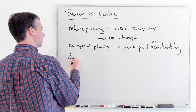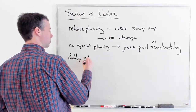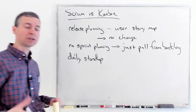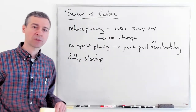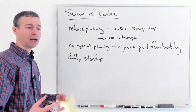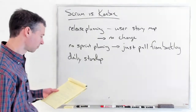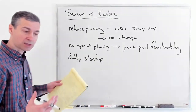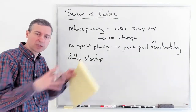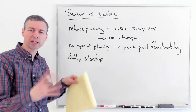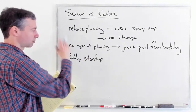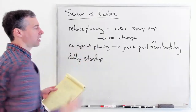One of the things you do in sprint planning is figure out how to break stories up into tasks. That work is pushed into the specify workflow, so it's handled as part of our workflow rather than all done in one big meeting. That gets rid of the waterfall-like thing of doing all specification and planning up front. We've still got release planning, but we don't plan out tiny little waterfalls.